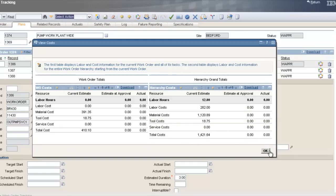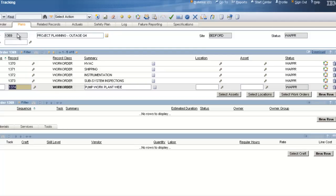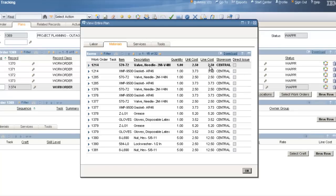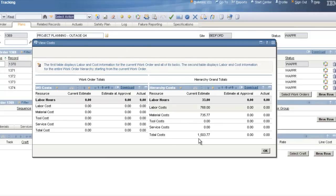This data can be downloaded to a spreadsheet to make a nice report. Going up to hierarchy one more time, we'll bounce up to the project plan — the overall top-of-site plan with all departments listed. Click Select Actions, View, Entire Plan. This shows at a glance all the labor needed for the entire outage. The Materials tab shows all materials required, quantities, line cost, and total cost. Downloading this table gives a complete listing of all labor and materials with total project cost. Everything marches up the hierarchy this way. Viewing costs at this top-level work order shows the entire cost for the whole outage — currently $1,503 — adding up all labor hours, labor costs, and materials.